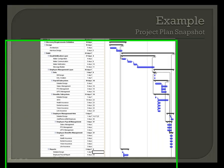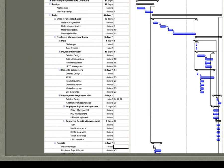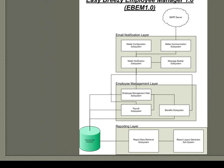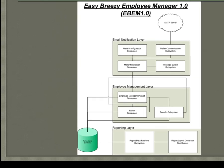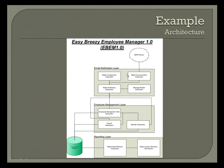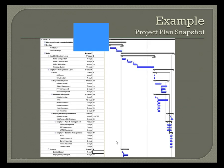Here, with the email notification, it and reports can go at the same time. So, it would be wise for us to have two teams working one on the email notification and one on the reports. And so, therefore, we'd want to create two branches, since in our architecture back here, those were two disjoint, two non-overlapping components that we could develop in parallel at once.